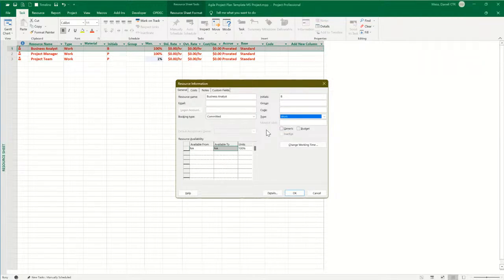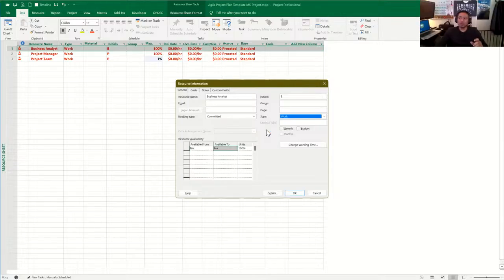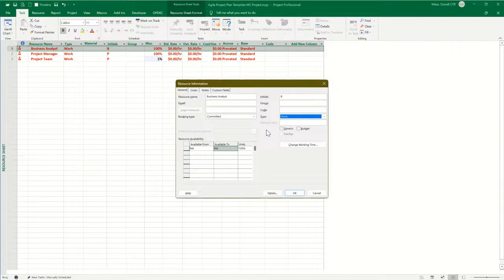Yeah, I understand where you're going there. I was working through some of this, Phil, and that's kind of where I was headed with it as well. So you kind of hit right on where I was at. Because you could use proposed as a showstopper to striking your baseline. You can confidently tell yourself and your stakeholders, look, I am not confident to strike a baseline due to having proposed resources only. Okay, right.